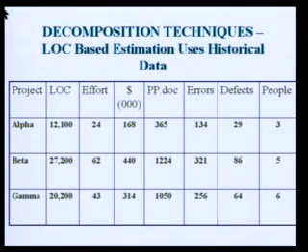But the most important thing is, after doing all these estimates, if I am saying $168,000, the cost includes the manpower cost, the cost of the software, the cost of hiring third parties, manpower agencies, marketing people, advertising, everything, and whatever discounts you offer to the clients. Total cost is $168,000.